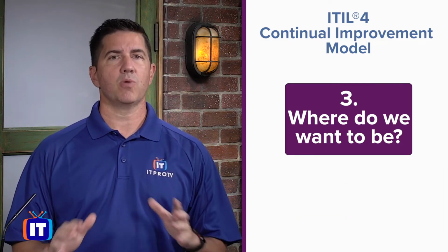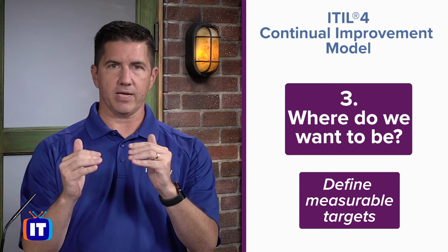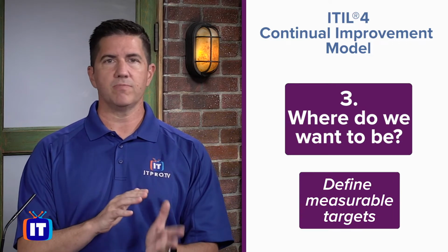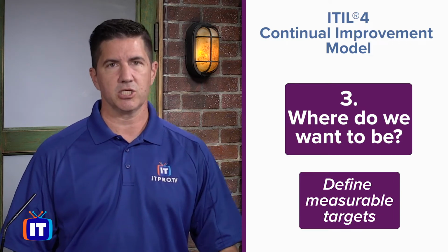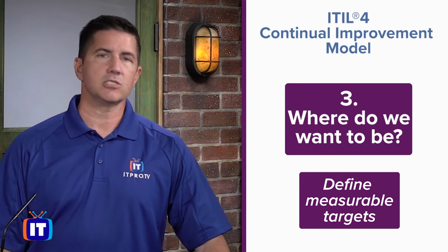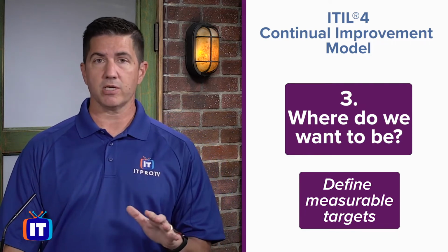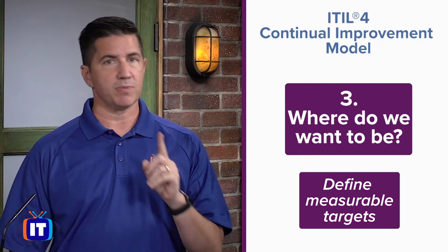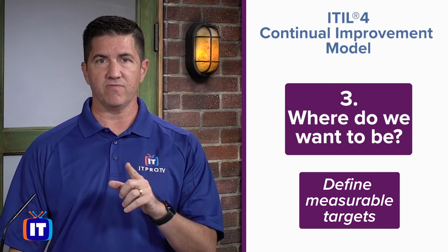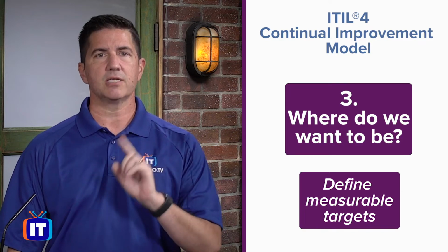Next step, of course, is where do you want to be? This is where you set the target, the end game, where you want to be at the end of this improvement initiative. And one thing that ITIL says is you should use SMART targets. Now, a little side note, SMART is an acronym that stands for specific, measurable, achievable or attainable, relevant and time-bound.